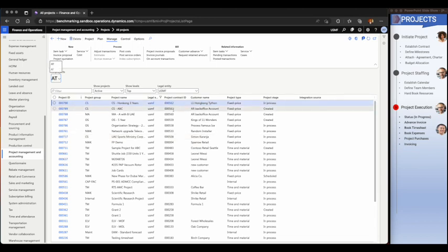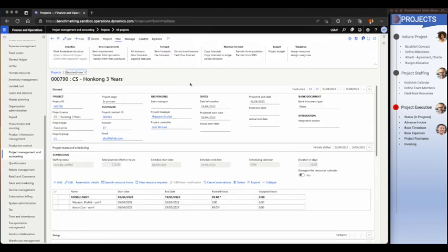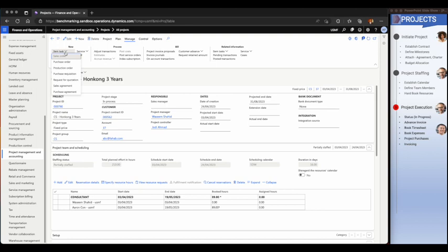As a next thing, I want to talk about the purchases on the project. So if I go here, what Wasim will do is that if he needs certain items, in this case, let us say he needs the Gartner subscription to put forth his case, he'll go ahead and create a purchase order if he is directly eligible to create the POs. Otherwise, he'll create a purchase requisition. And the same thing applies for Aaron as well. If Aaron is eligible for creating PRs, he will do it.